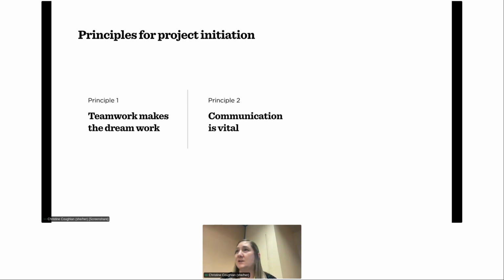When we do have to make team changes, we make sure that we have an onboarding process in place for that new person. And most importantly, we write things down. We need to make sure that we are writing down all the decisions. I can't tell you the number of projects that I've been on where I have a client that says, we didn't make this decision. And I'm like, but here's the notes where you did. So great. How do we move past this?